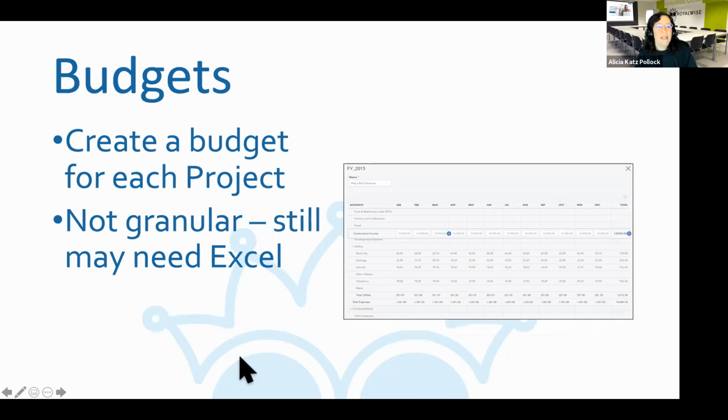Now, there is also a need for budgeting sometimes. When you're trying to put together that estimate, sometimes it's helpful to use the budgeting tool and create a budget in QuickBooks Online Plus or Advanced. And then that way you can still do your budgets versus actuals, as a corollary to doing it inside the estimate. Now, for complex projects, the budgets are still not really enough because you need to get a line by line granular list before you know what that total is to put on the estimate.